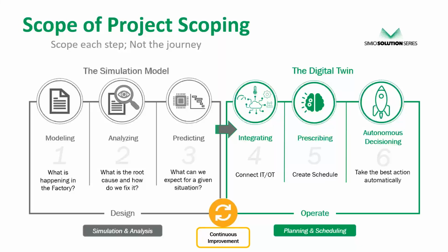And it definitely helps keep the scope manageable, right? I think when we talk about a large scope document and trying to build a project plan around every detail that we need included in a digital twin, it's hard for all of the stakeholders to consume as well. So if we can break that down into easy, digestible milestones that people are going to resonate with and understand why we're getting to that step first, that is really the goal with model scoping. And you can really start, within a single scoping effort, to break down the milestones and scope each of them in detail if you're ready to do that.